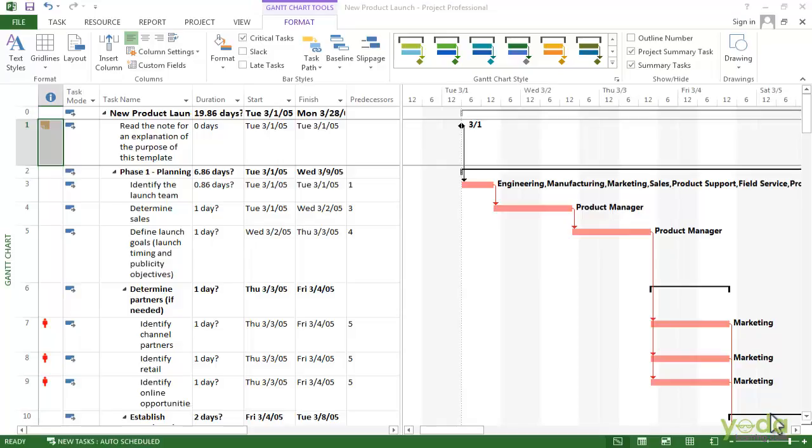Project's level resources feature delays and splits the resource assignments to help you get rid of over allocations. You can level the entire project or just the portions that are giving you trouble. You are going to work on resource over allocations. The best view is the leveling Gantt.